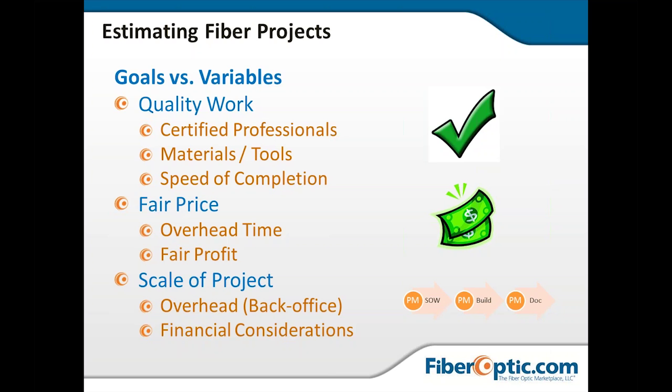But when you feel like you're in a very competitive bid situation, you sometimes try to focus on just the labor hours and the man hours that are potentially in the field and ignore some of that back end or overhead that really needs to be considered.